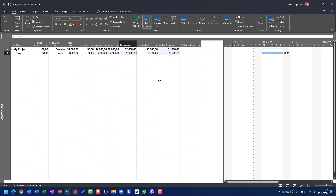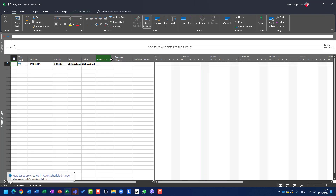Budget variance is calculated as task budget minus remaining. If I mark the task as completed, you will see the actual is $4,000 and task budget was $3,000 — meaning I exceeded my budget.